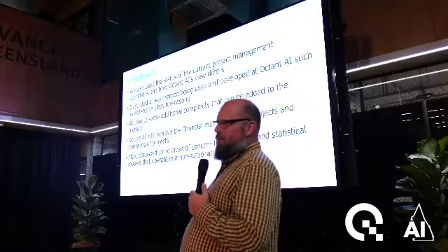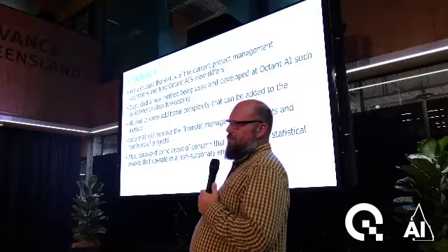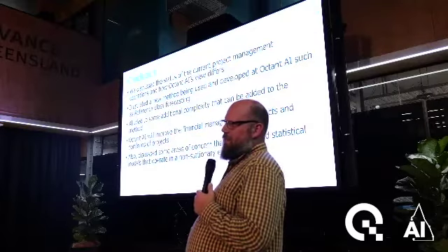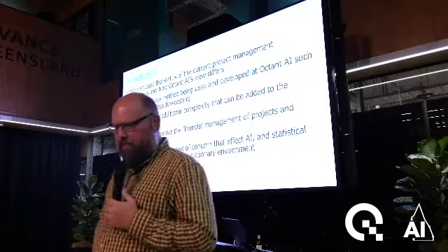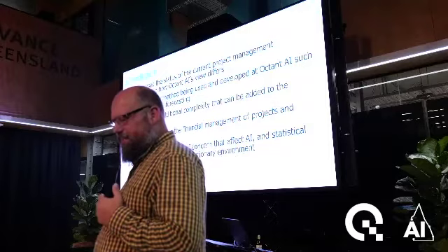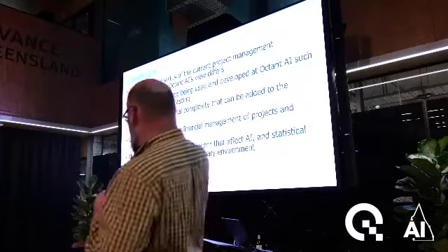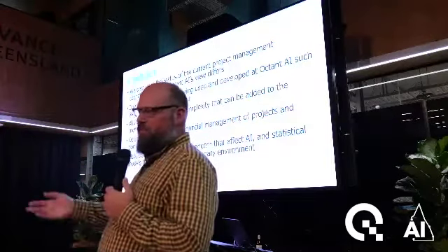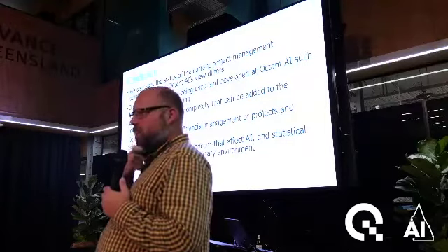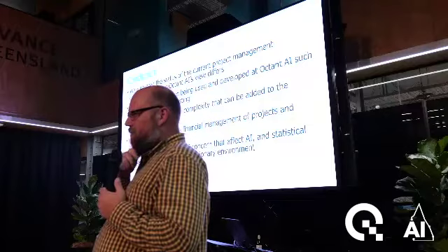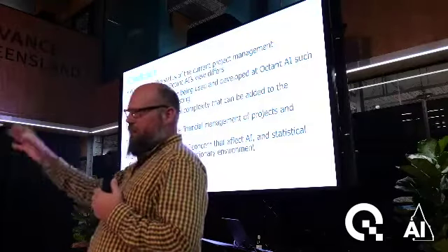We're going from a range of someone exporting from Microsoft Project, all their resources, their timelines, their gates and expenditure and so on. So if you're using a big model, you could do that. But with the simplest models that we use, we try to get accounting data. So you're basically showing how the costs are evolving through time, just like I showed with that S curve, with revenue, with margin, all of these kind of parts, and how their forecasts are changing through time. So it's quite small, that data set, but that's the reason for it, so that we can access those customers.